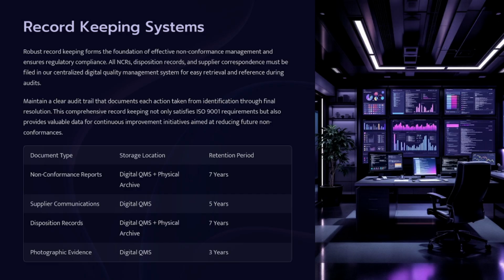That is all about the sequence process for how you can handle the non-conformance material. The first step was you need to create the NCR report with all evidence. Then you need to identify what the root cause is. Then you will send this report to your management or your senior. They will contact the suppliers to determine whether the problem is with the supplier, the procurement, or internal.